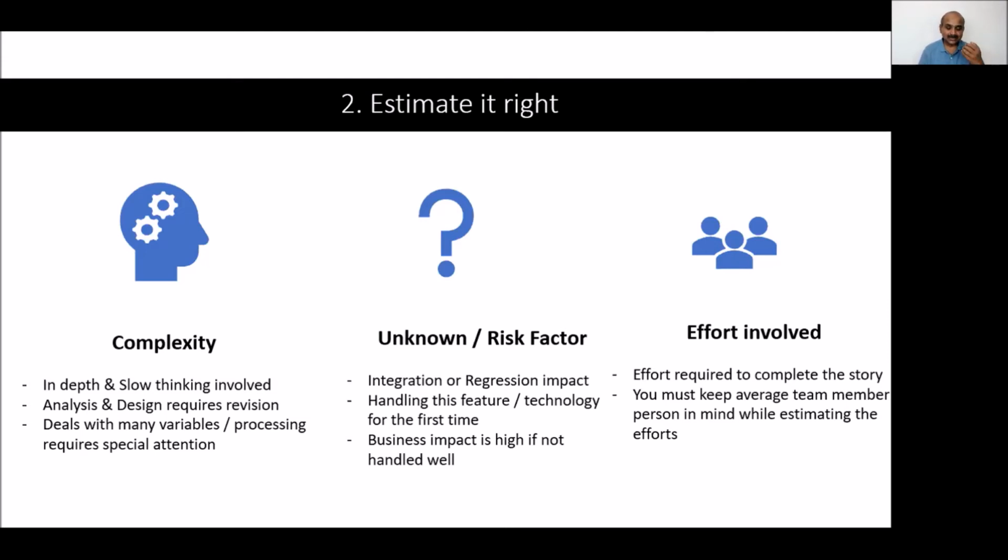So a downtime of a specific application is not just about the product, the brand also suffers, right? So we have to really understand the risk factor, and we have to spend more effort in ensuring that those risks are rectified or addressed. And third is effort, and this effort is the effort of an average competent person, not a very efficient person, or a very low or newly joined person.